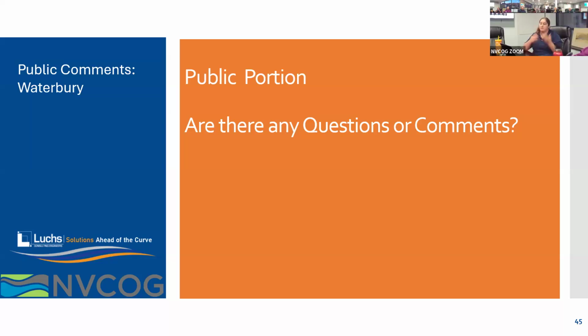So I obviously can't speak on behalf of the city. We work for the region here, but what I can tell you is the next steps, right? So at the end of September, we finish this project and we hand a big packet to the city, and that has these plans that we've talked about. It has a 200-page report of a bunch of background information that informs these plans. And then it also has a list of different grant programs, mostly at state and federal level, that could fund implementation. And they'll also get some tools to help them write the grant, like we'll have a draft narrative for them, so it'll be a little easier.